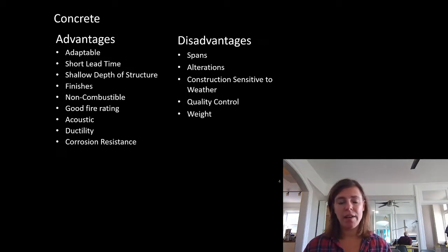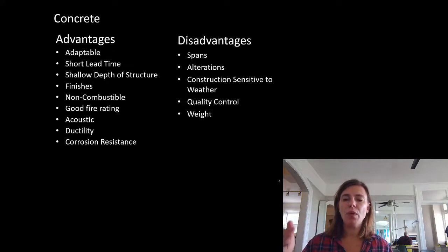It's doing its work. We talked through why it's important and why it needs to be where it is, and also how they could go about laying it out. This project was maybe a bit outside of their skill set, so we had to have a few conversations to talk through how to put that in. But that's a risk you run when you're dealing with concrete. That's why quality control reviews are really important. You need somebody to come out and take a look that does understand the implications to make sure that everything is where it needs to be.